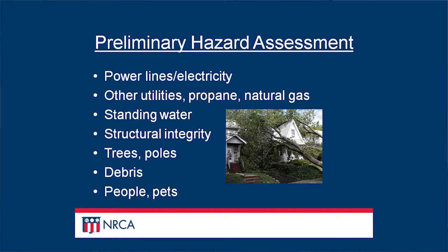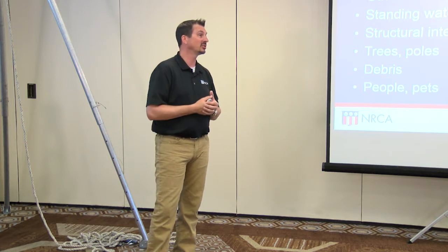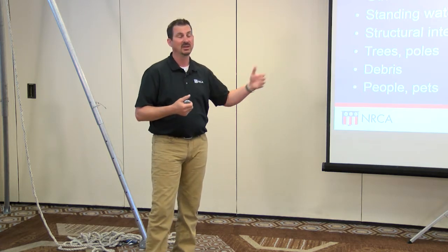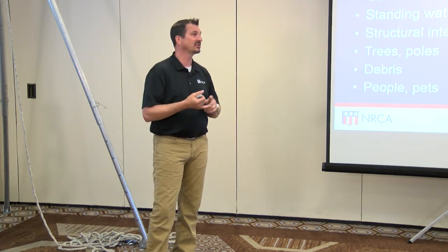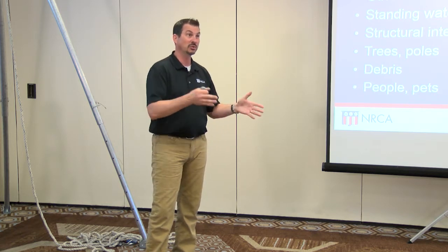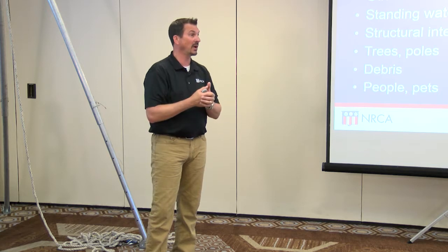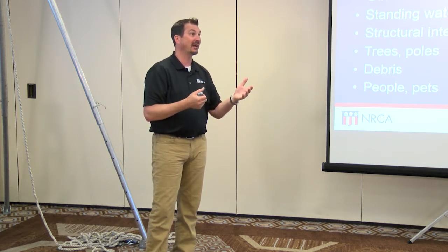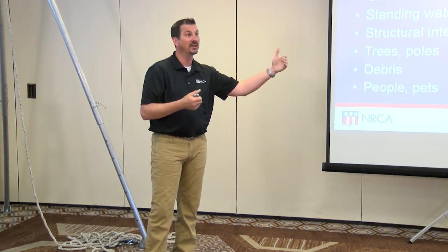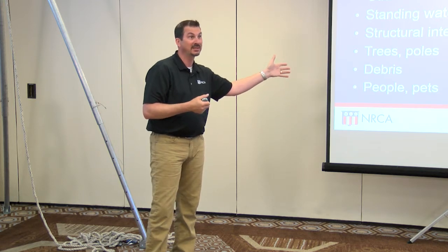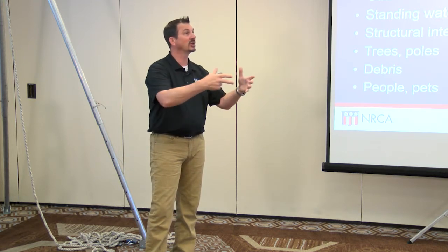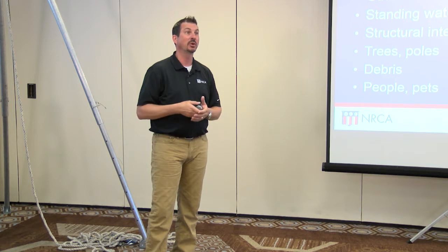We should also be looking for exits and entrances to the facility. Talk to the building owner or facility managers about whether or not they actually have shift changes during the course of your day and how that might affect those workers and how it might affect your work as well. Because of course we don't want workers, employees, the general public, people, pets, or anything of that nature coming into our job area and actually being put at risk.